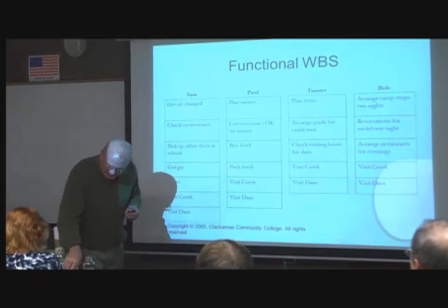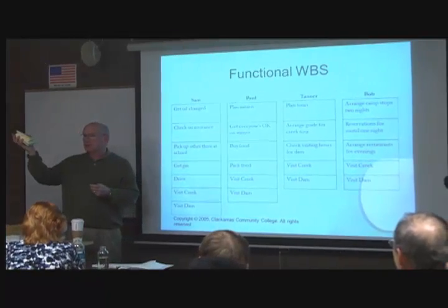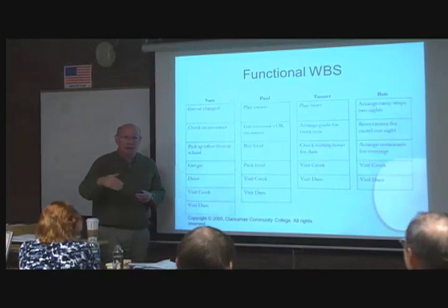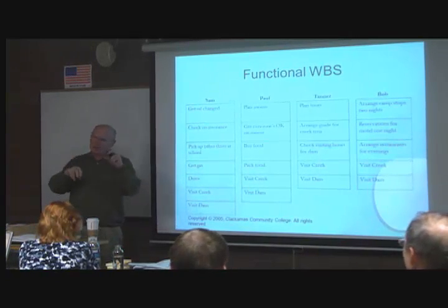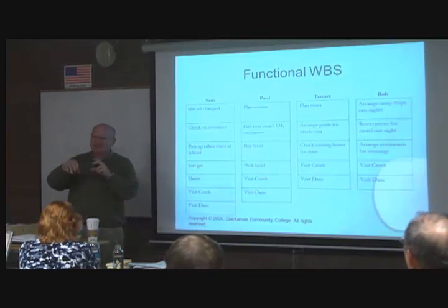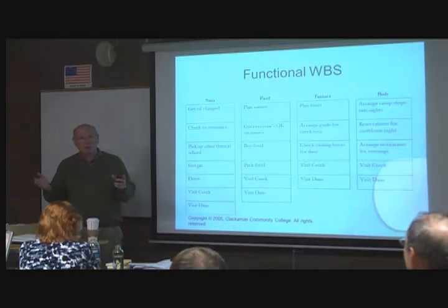And typically, we say the best way to do that is good old-fashioned sticky notes. You start with brainstorming and sticky notes. You identify everything that needs to be in the project, and then you might put them in a functional alignment and go, well, that doesn't feel right. Let's do this in a phased alignment, and you move the sticky notes around. That's the best way to do a work breakdown structure.